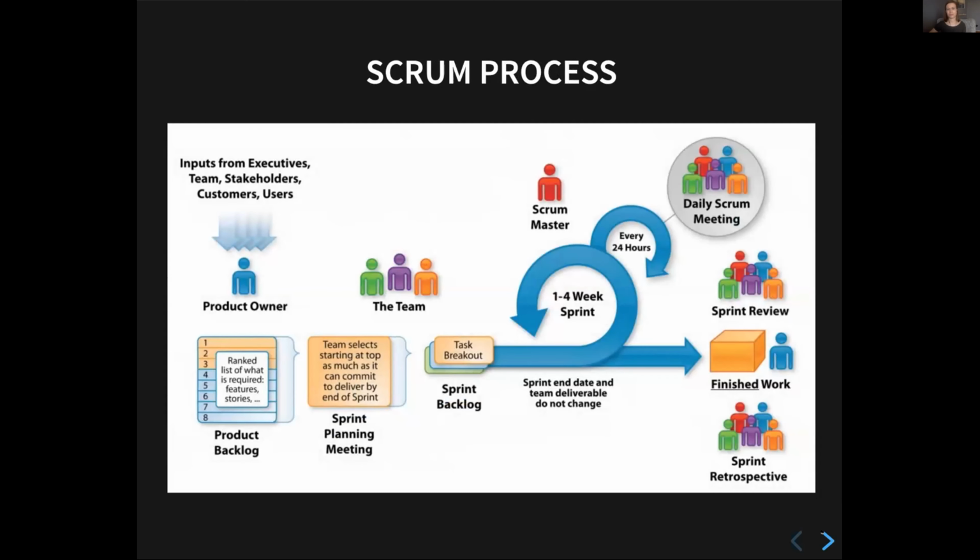So we'll stop a little on the Scrum process. It is cyclical. It consists mainly of sprints. A sprint is some duration of time. People decide before starting to use Scrum which time is determined for a sprint. It's mainly 1 to 4 weeks. One week is used rarely because it's for some specific projects.